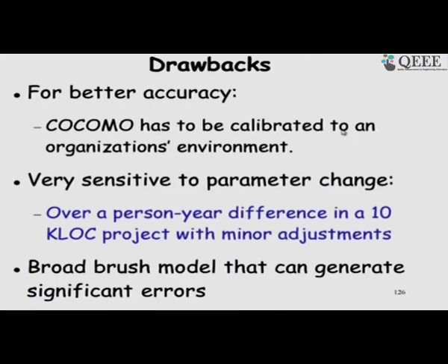One thing that we need to mention here is that organizations can calibrate the different adjustment factors that have been given in the table, depending on their past projects.